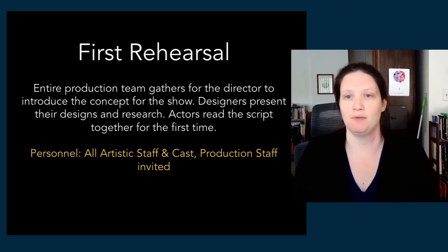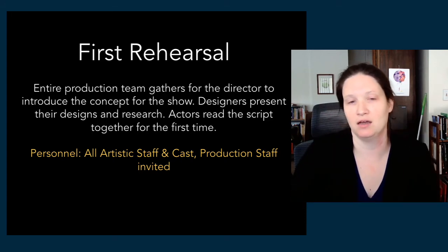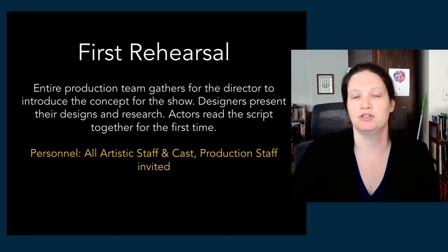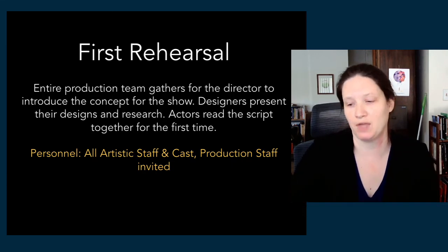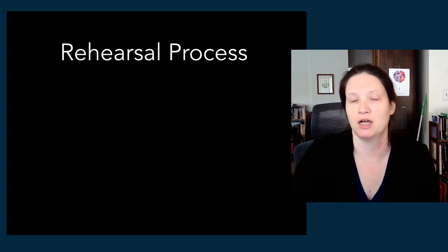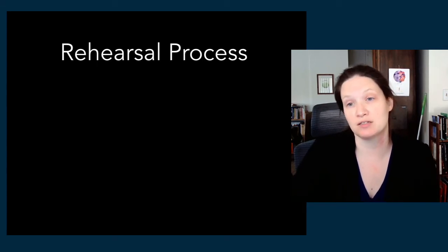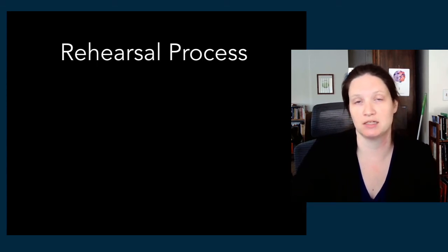So it's generally a big group meeting, full team meeting, where everyone gets together to read the script as a whole after seeing all of this presentation work. So then we go into a rehearsal process, which is 4 to 6 weeks. It can go longer in an academic situation where there's a limited amount of time available to rehearse, right? You guys have other responsibilities.